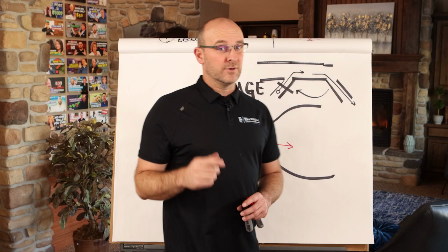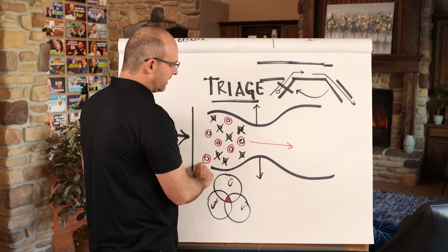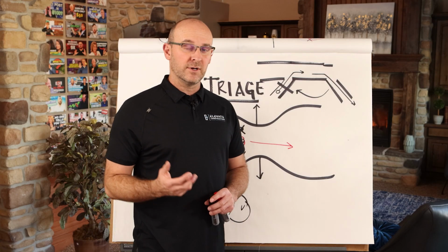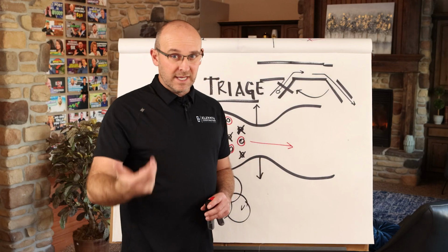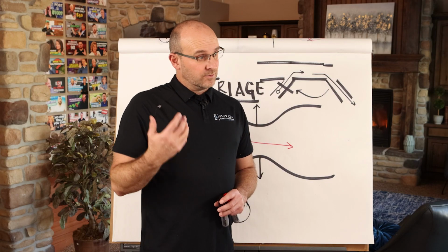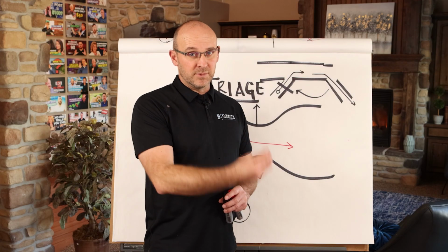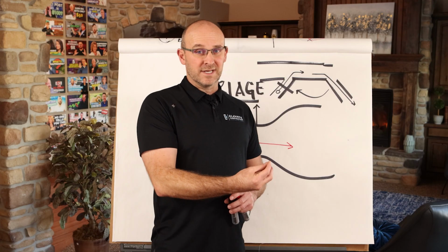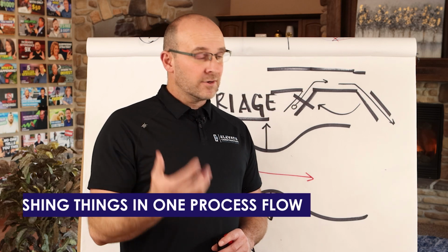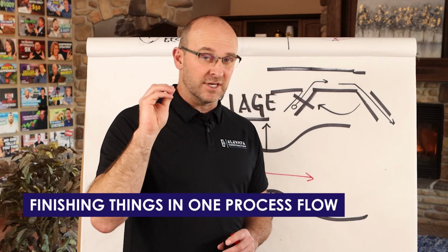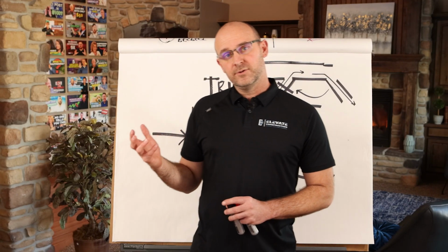Three, and this is a big one, especially for trade partners, instead of just cramming the job site full of workers and materials and equipment that may not have work to do, meaning they're not getting past and being able to complete the work because we don't have the capacity to do so, instead of bringing all those resources and people and equipment out to the job site that are just sitting there costing money and burning through labor hours, literally you're waiting for the right time to finish it in one process flow, and you're saving a ton of money.